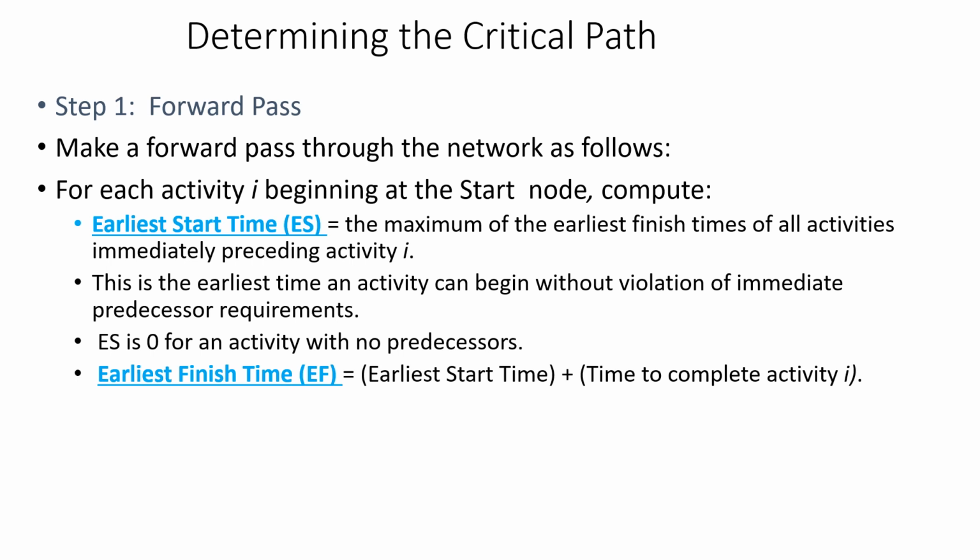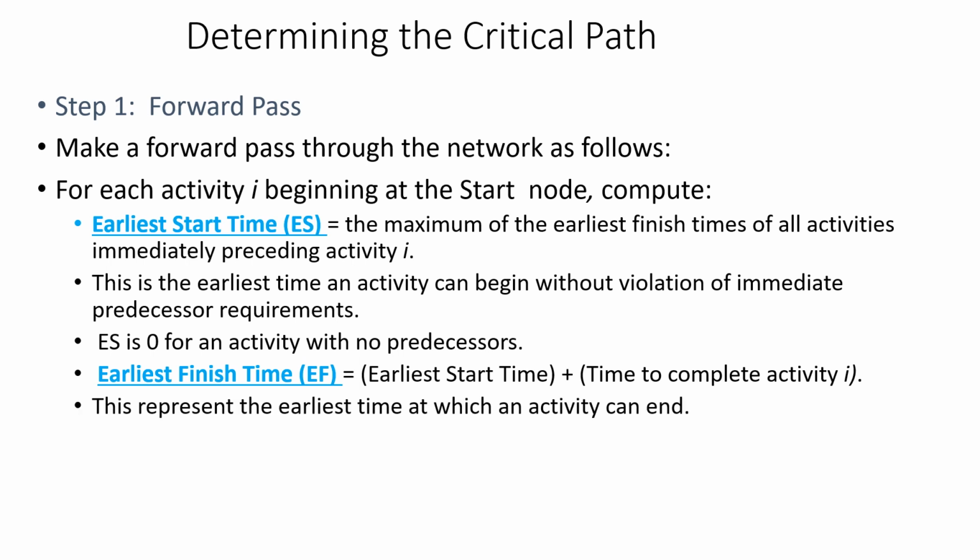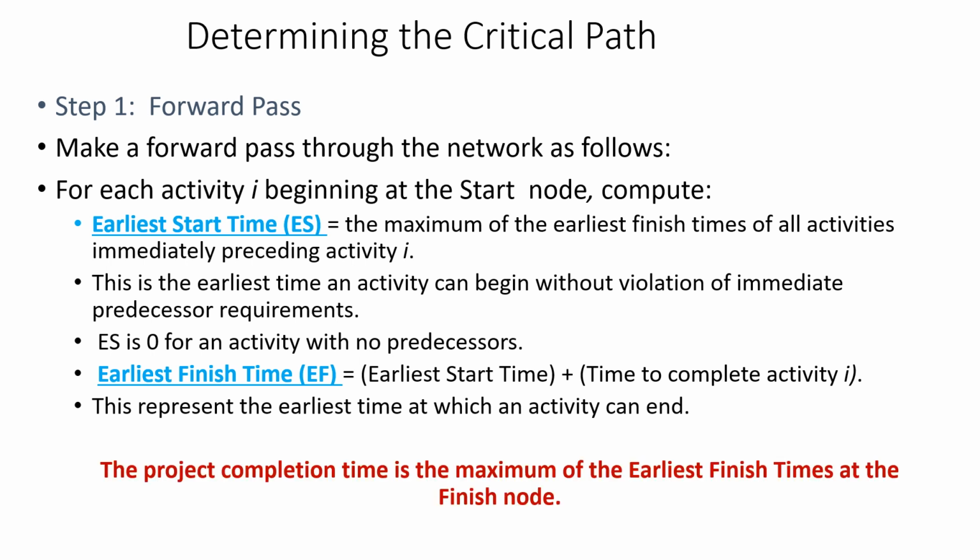The next time we calculate is earliest finish time. Earliest finish time equals earliest start time plus time taken to complete the activity I, or duration of activity I. Earliest finish time represents the earliest time at which an activity can end or can be finished.